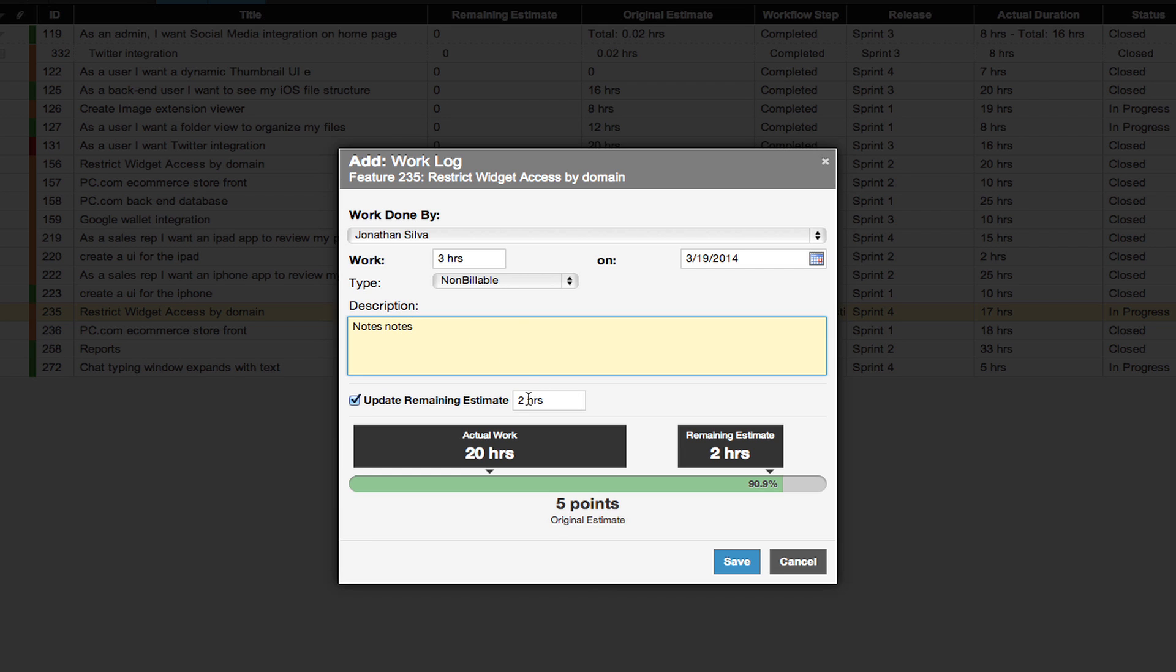This is also where you can update the remaining time estimate, which is the value used to calculate your burndown chart.